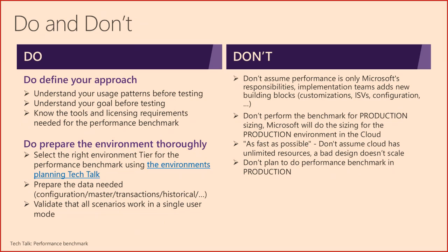You may need consultants to help you. You may need people from business or some data migration to happen first. So make sure to consider that data preparation. And as you're preparing the test scripts, make sure that they work in a single user mode first, multiple times, to confirm that your tests are fully ready.